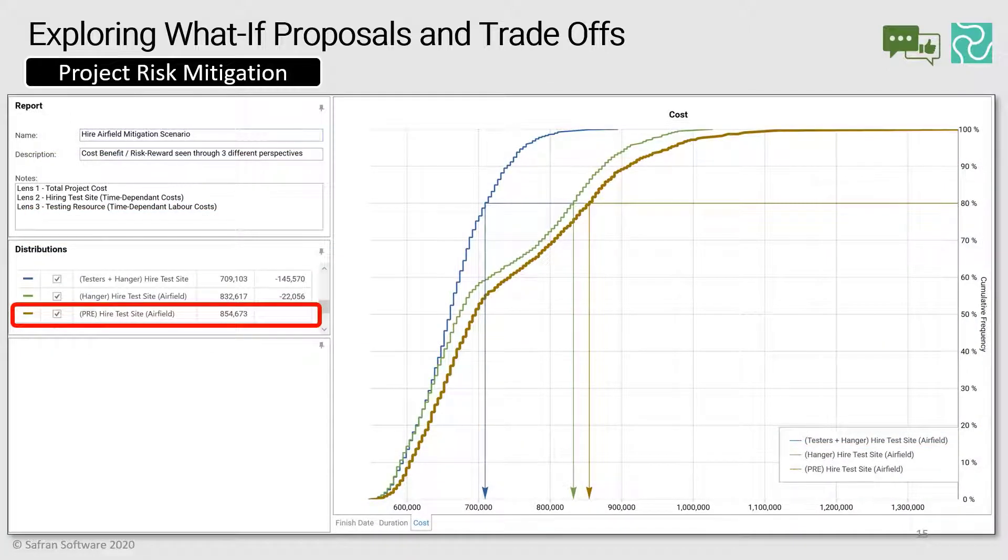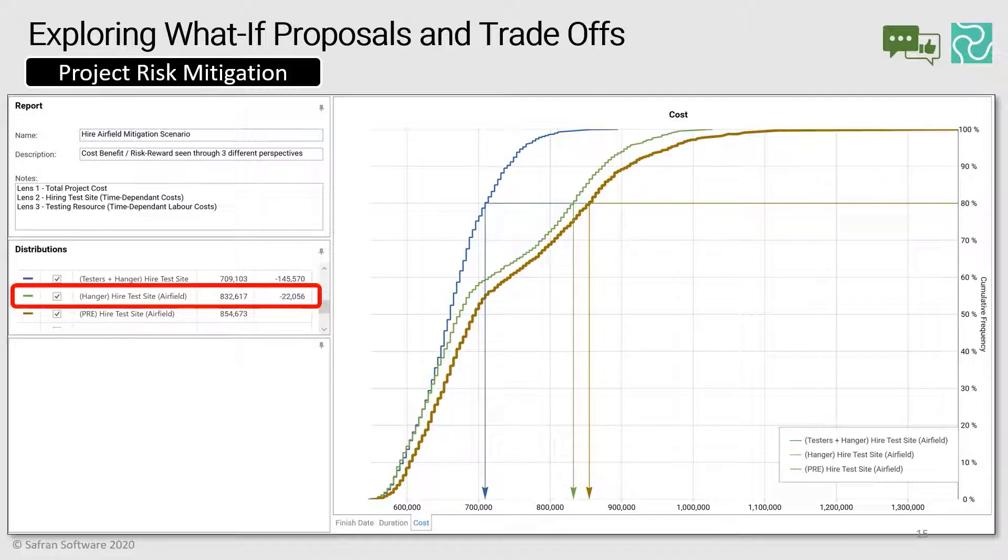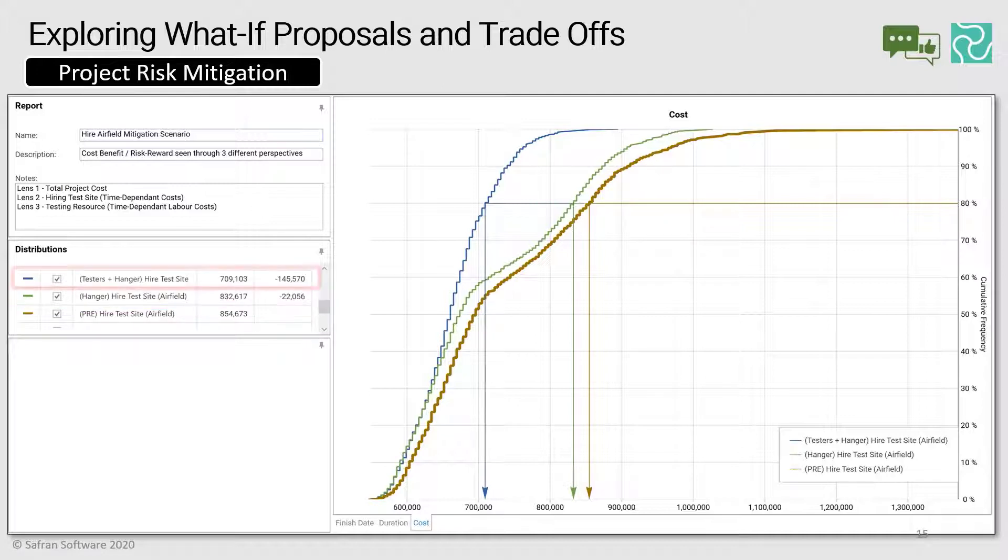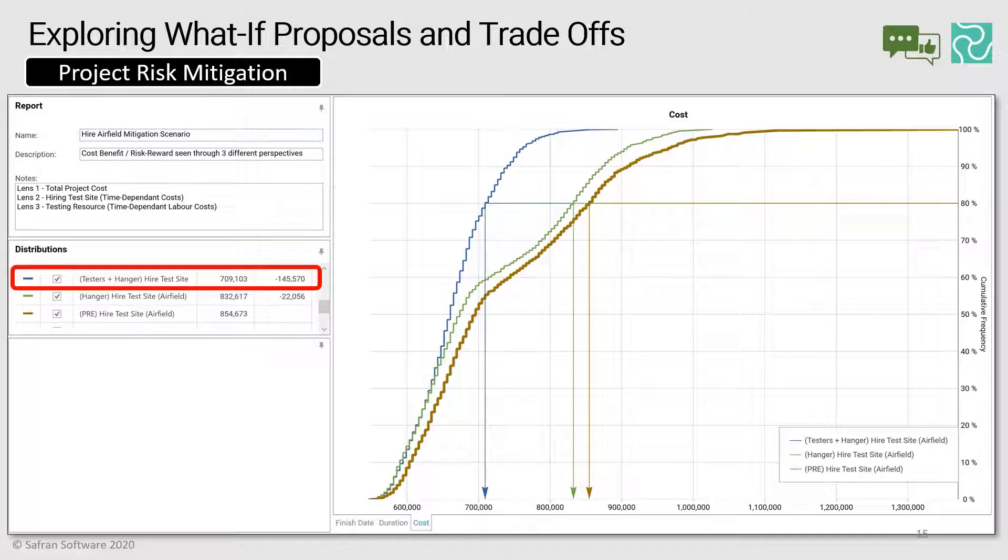This grants us our first perspective, where we can see the brown S-curve is our pre-mitigated position, creating a baseline to measure effectiveness against. And we've selected the P80 confidence value for this. Then considering just our weather risk mitigation in the green curve, we're registering a slight time saving, which in turn is converting into 22,000 worth of time dependent cost savings. And then we can also layer on the next mitigation, the extra diagnostics team. And despite paying 25 grand upfront investment for this additional team, we can almost consider a net neutral cost because we've saved 22,000 via the weather mitigation. So the combined effect of the savings against the pre-mitigated baseline is over 145,000, and the cost-benefit analysis with one strategy virtually funding the other is obvious.